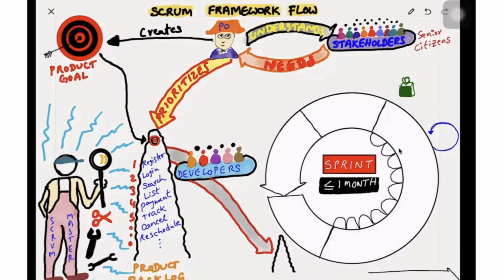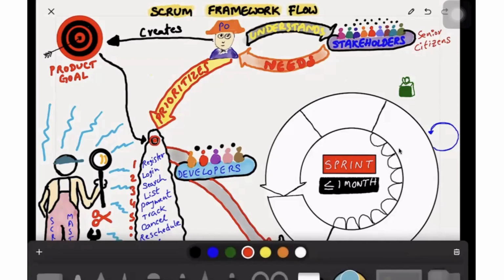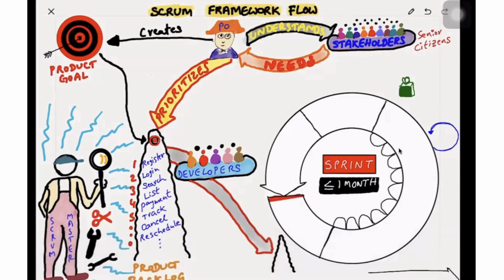So the Scrum team decides the sprint length according to what suits them. Usually short enough to get feedback, long enough to create the value. So that is how the Scrum team will decide the sprint length. Within the sprint, the first day event is sprint planning. So what happens in sprint planning? Generally, sprint planning comes with 3 topics: why we are building the increment, what can we do to achieve the sprint goal, and how we can achieve it.